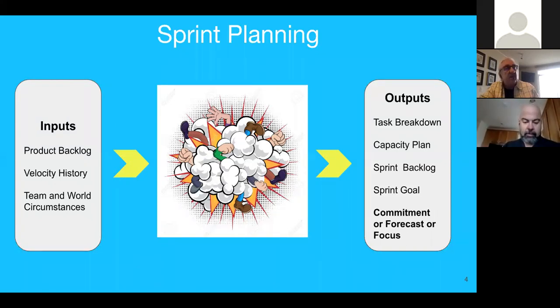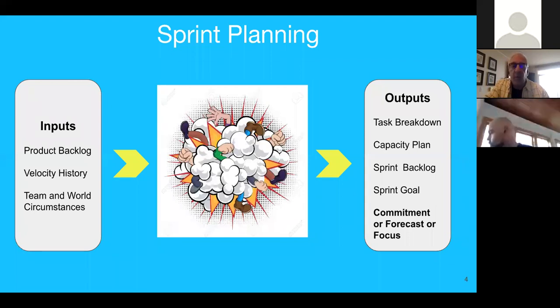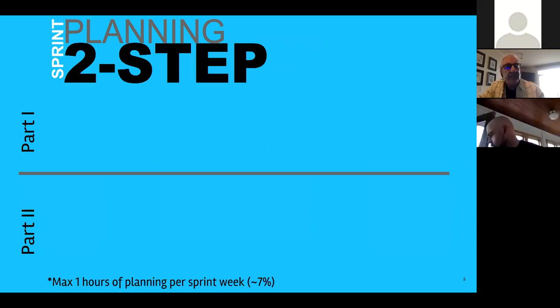And oftentimes a team will choose a sprint goal, which is something other than complete all the stories we wanted to do. The sprint goal might be something like finally achieve everything we need to release this to our biggest customer, or finally get this into the production environment. It could be anything that goes over and above an individual story. So all of these different pieces help the team understand their work and help them work together to achieve what it is they want to do.